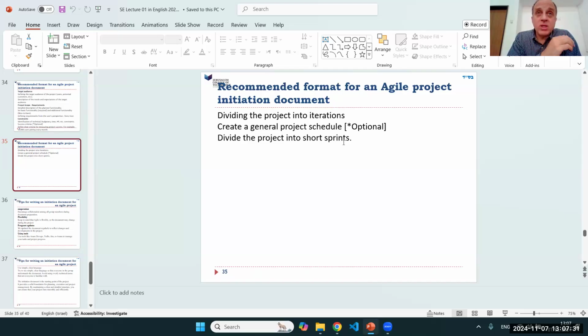The point is to not just work on everything all at once, have nothing after 6 months, and then hope to have everything finished after 7 months. You want to have after 1 month already a couple sprints finished and things done. So you define what your sprints will be, and you divide the project into those.